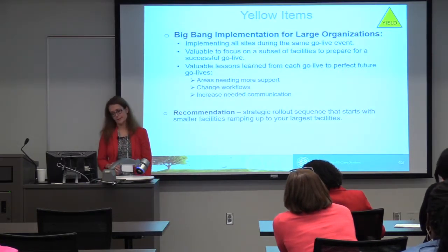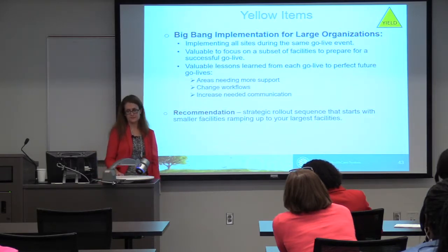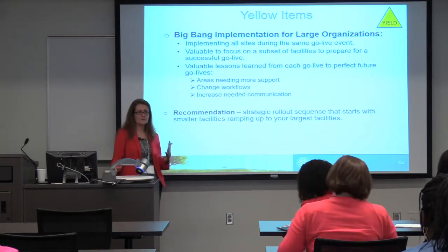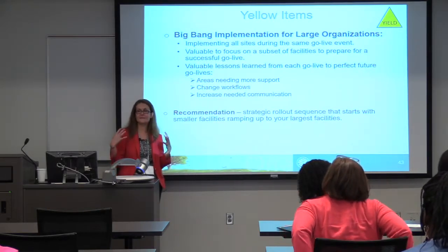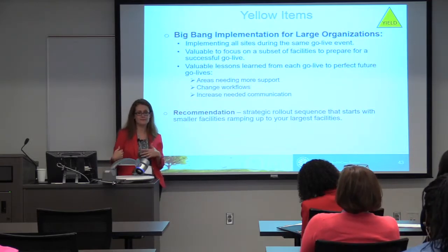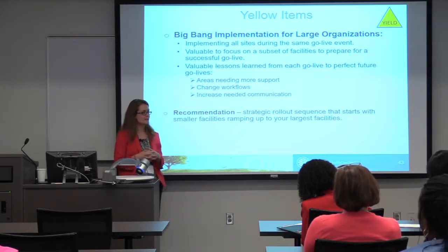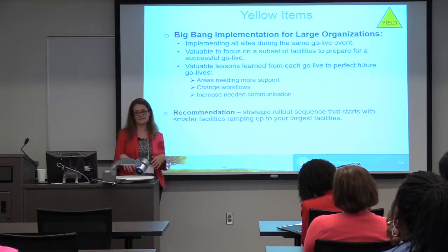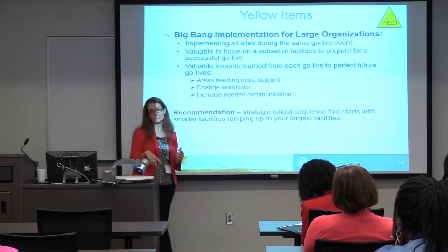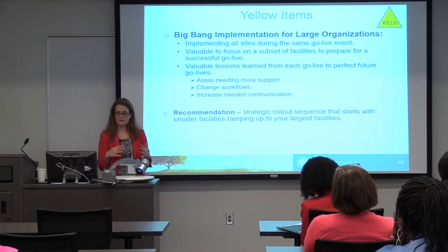All right. Pump the brakes on Big Bang implementation if you're a large organization. I don't know how I would have survived if we had gone live at all 24 acute locations at the same time. I won't even talk about the practices. It's just not possible. And quite frankly, Epic was really pushing us to do that, to just flip the switch. We just could not do that at all.